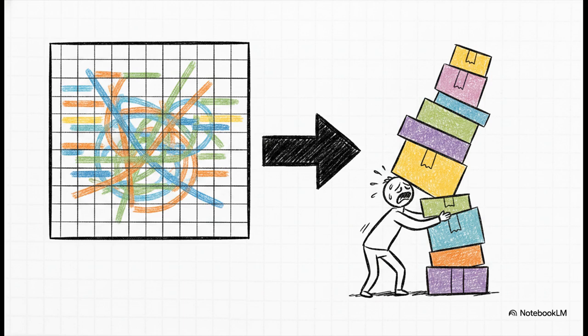As you maintain this document, you need to pay very close attention to its behavior over time. If schedules constantly overlap or contradict in your spreadsheet, it's not just an annoying formatting issue, it's a massive red flag. Translating a messy spreadsheet into physical reality means your resources are actually overloaded on the floor, and those tasks must be broken down further to reflect what's really happening. A disorganized, impossible-to-read chart usually indicates a deeper operational flaw in your facility that requires your immediate management intervention.